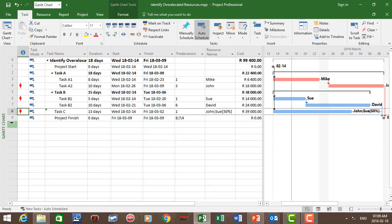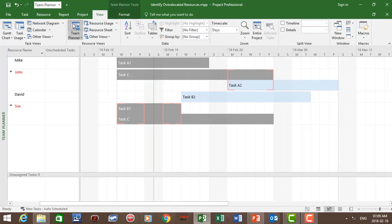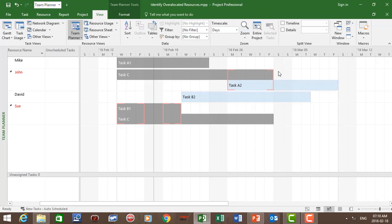Now let's go to the team planner view. Click on view, then team planner view. In the team planner view you can see John and Sue are over-allocated. On the right-hand side we have the tasks allocated to the resources. For John, task C and task A2 are allocated, and we can see there is an over-allocation during the week of the 26th of February — Monday, Tuesday, Wednesday, Thursday, and Friday — and the week of the 19th of February — Monday and Tuesday.